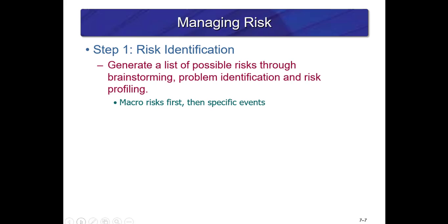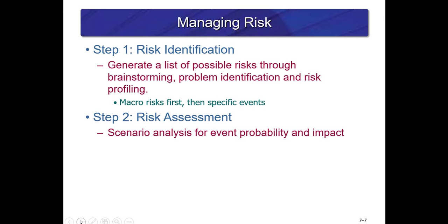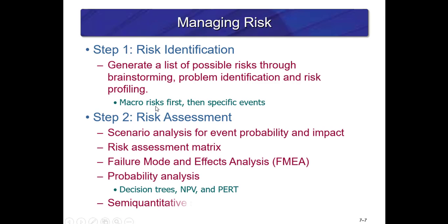So this slide goes into detail. Step 1, it explains that you would start with your macro risks first and then specific events. Risk assessment involves different tools and methods, including the risk assessment matrix, failure mode and effects analysis, probability analysis, and then scenario analyses.